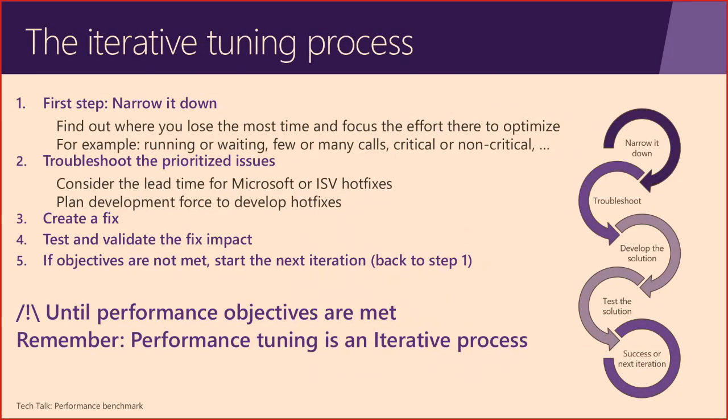The final critical aspect for the performance benchmark is really that it's an iterative process. Most of the time, the project managers will allocate just one iteration to do a sort of validation of the performance, but it's just not enough. You're going to have multiple loops, multiple iterations to basically identify the bottlenecks, if actually the scenario is running or not, if there's a few or many calls,